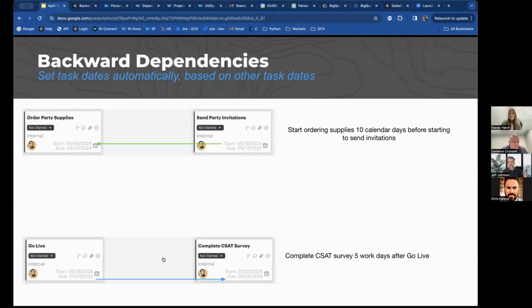But now with this new enhanced recipe that implements the backward dependencies, it can implement this finish to start with a lag type of dependency with no modification to the template. So with either of these types of dependencies, what we're trying to do is say we would like GUIDEcx Recipe Builder to detect whenever this task changes, and automatically update the dates of this other task.